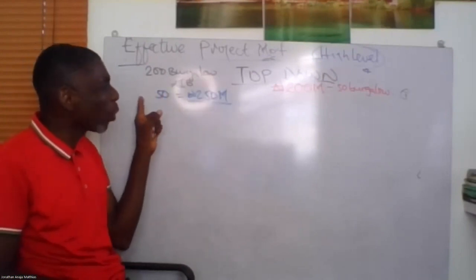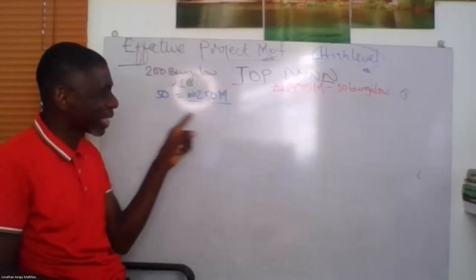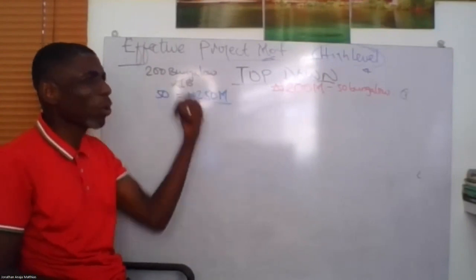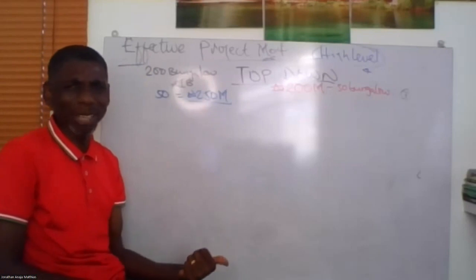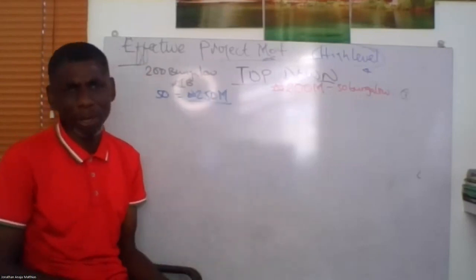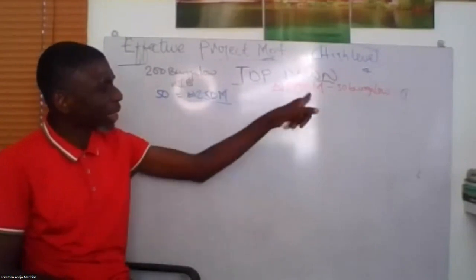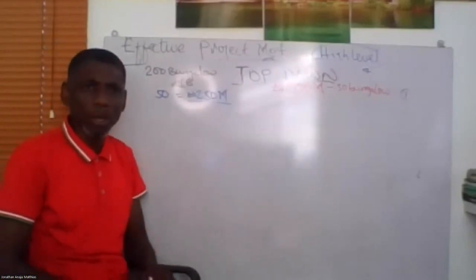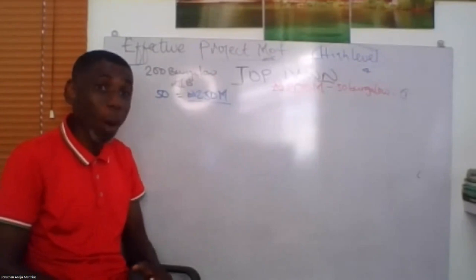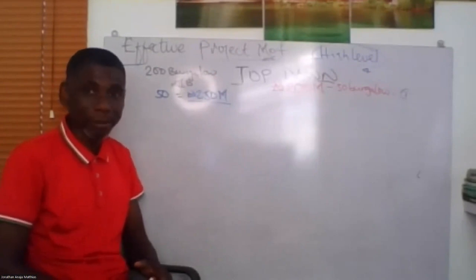Now, I have analogously estimated this, right? But the client now went ahead and said, even this my analogous estimate is not going with it, that he doesn't have that kind of money or budget, and he has to do 50 million. So what has he done? He has given me an envelope. So what kind of estimate am I going to use? This is now a top-down estimate.